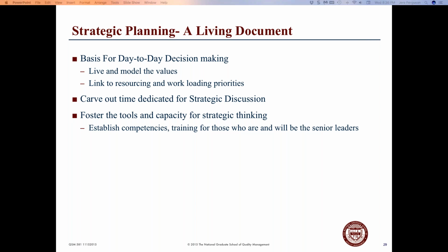Carving out time for strategic decisions. The plan itself should have built into it points where you get together. We often call those gatekeeping events, where we come together, reevaluate the process, make sure we're on task, and authorize proceeding with the project. And then we try to build tools that encourage strategic thinking and establish training protocols that keep everyone informed and keep senior leadership informed with where the project lies.